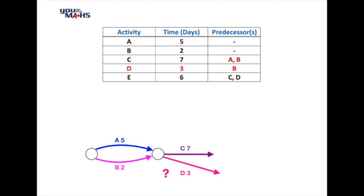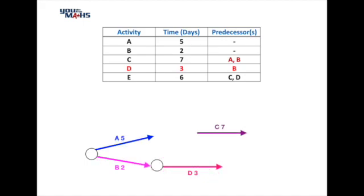One option is to draw activity D coming off activity B by itself — in other words, with no link to A — but that creates a problem when we want to draw activity C. So we appear to have a conflict in our diagram and we need to get around that.